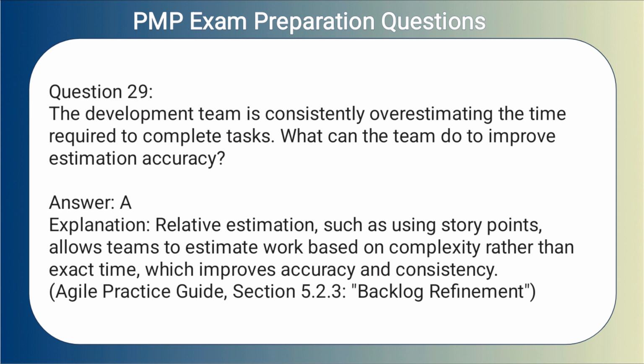Answer. A. Explanation. Relative estimation, such as using story points, allows teams to estimate work based on complexity rather than exact time, which improves accuracy and consistency.